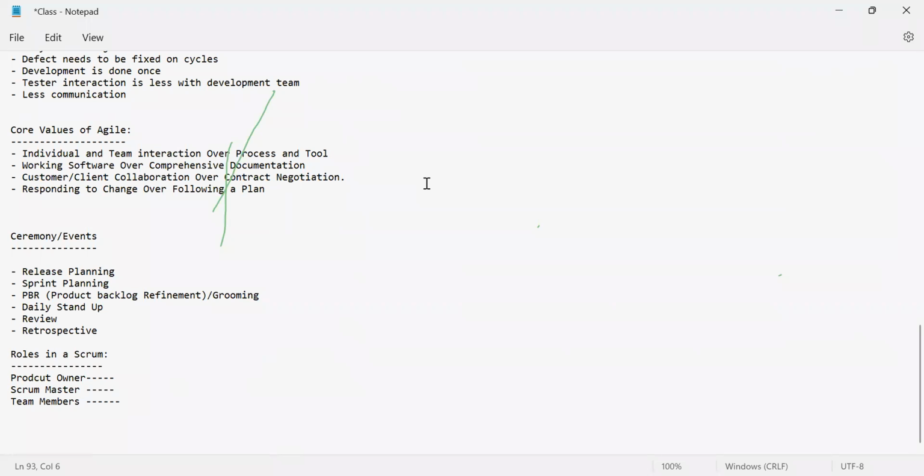Sir, can you repeat retrospective, sir? Retrospective. Okay. Retrospective is a meeting which is again time boxed to 1 hour. Four questions need to be answered by each and every team member. The attendees for the retrospective are team members and the Scrum Master. No other, even the product owner will not be part of this retrospective.